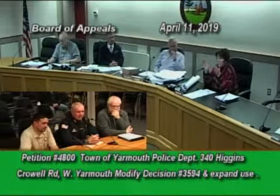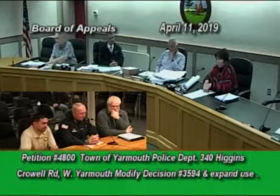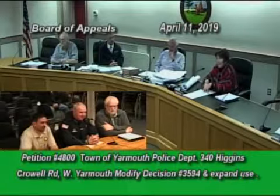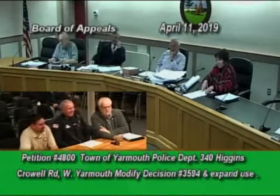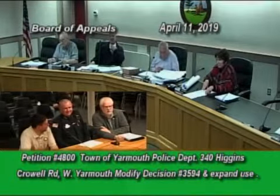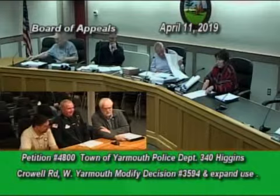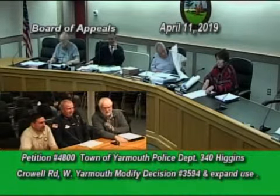But you have a certain amount in your budget for this particular item? Yes. And you hope to keep it within budget? I hope so. Certainly. When we first talked to the movable wall partition company, he threw out a ballpark price of around $125,000. But then he went back and did the whole quote, and it came out at over $300,000. So we were like, no, we're not going to do that.